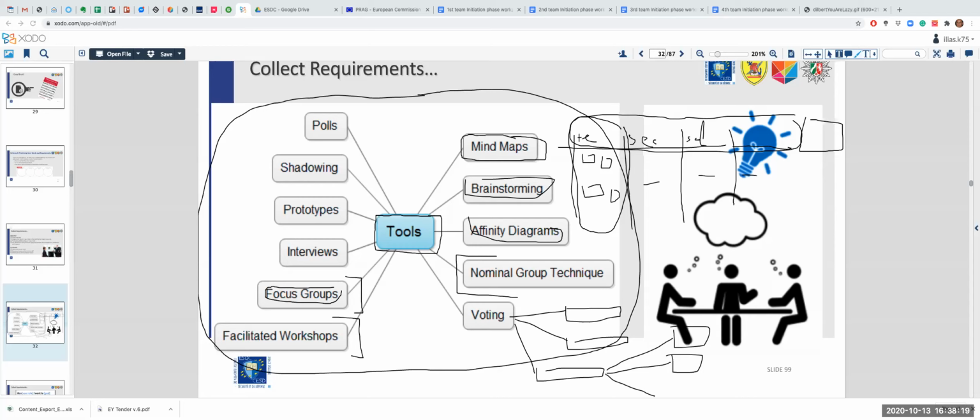Here, on the contrary, you will not have a moderator, you will have a facilitator, because this meeting should conclude with a consensus. And what do I mean? You, as a project manager, communicate at the beginning the needs of the project as already identified. I will need these resources, I will need these elements, and so on and so forth. And then you will find the HR guy with the financial department fighting over whether they can afford the resources, whether the HR department can recruit the resources for the benefit of the project, and so on and so forth.